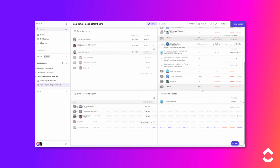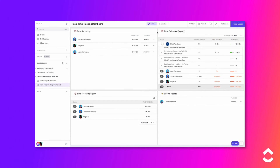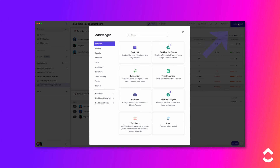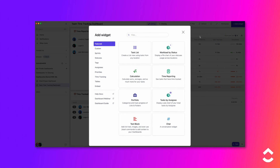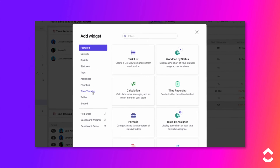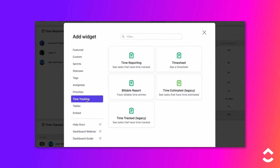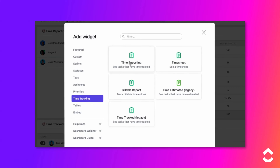Let's add time tracking widgets. Time tracking widgets can be added to new and existing dashboards. To add a widget to a dashboard, click the Add Widget button in the top right corner. Select the Time Tracking widget category, then select a Time Tracking widget.